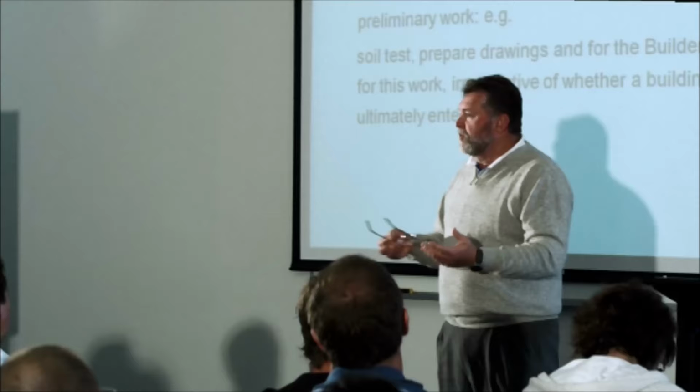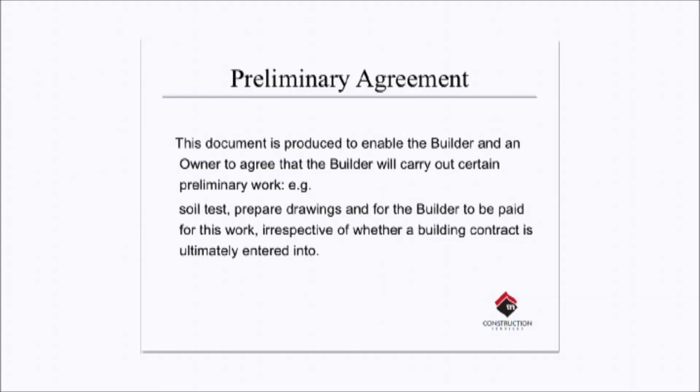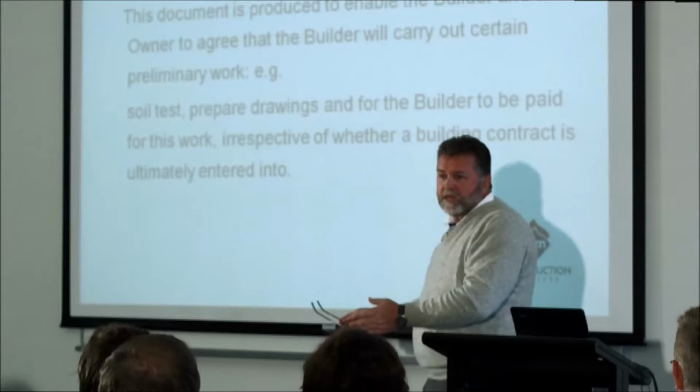So a preliminary agreement is just a standalone document. It is outside of the contract. So get a spec done, you need the plans done, soil test done, site survey, and it's not formed part of the contract. The contract part comes later.